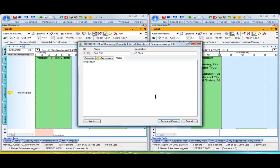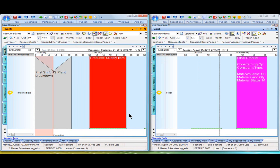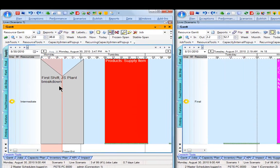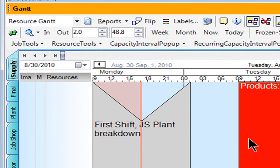When I save and close this, you'll notice that both plants at the same time are automatically rescheduled based on those constraints. In my supply plant, there's my lack of capacity on that Monday with the note I entered. That causes that particular operation to go red. That's a capacity bottleneck.